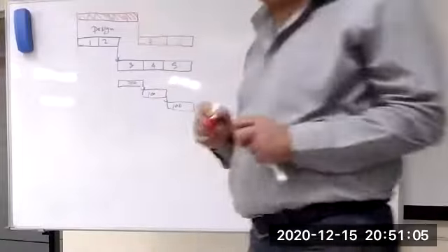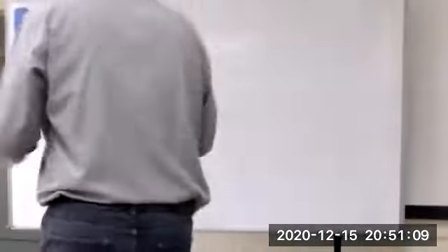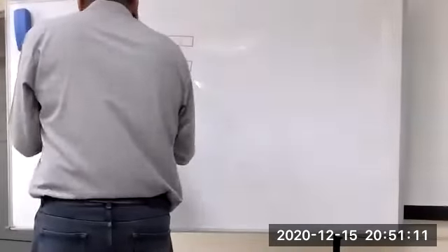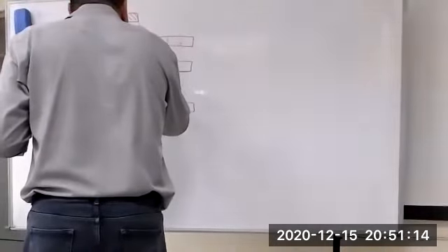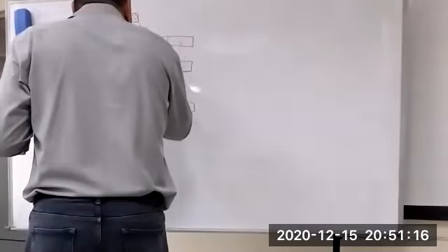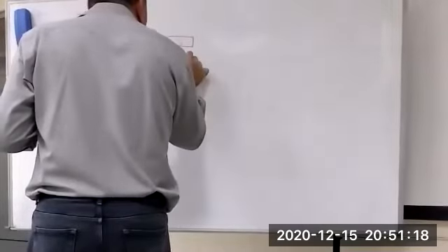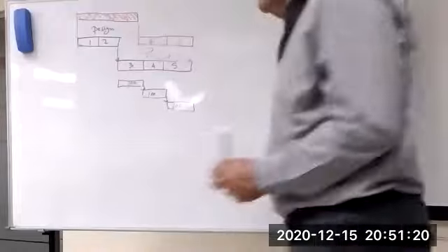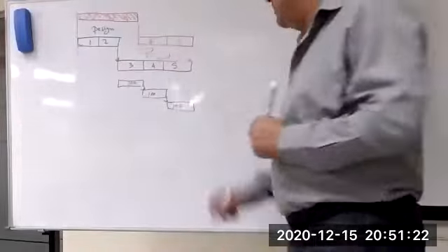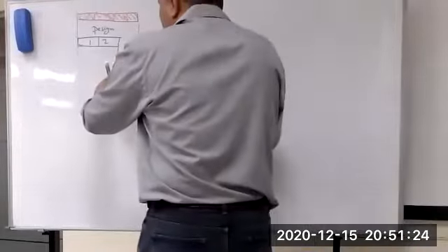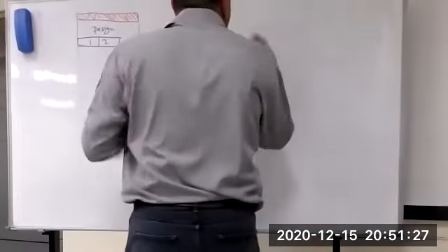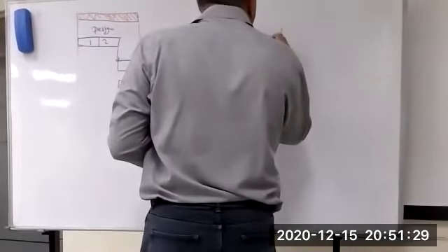What will you do now? You need to finish in 3 years? No, I will not finish in 3 years. What will I do? I will do it this way, with overlapping. Instead of the 300 villas taking 3 years, I will work on all of them, starting from the first 100 villas.